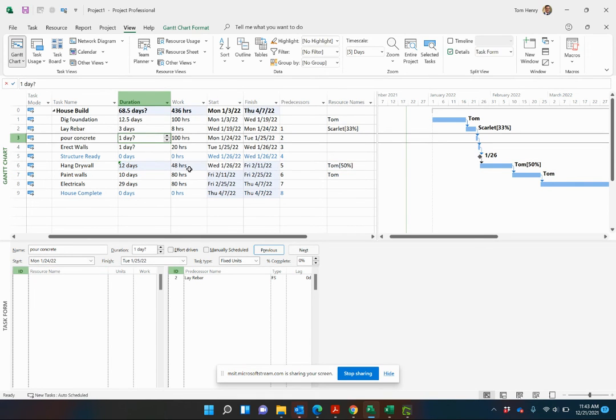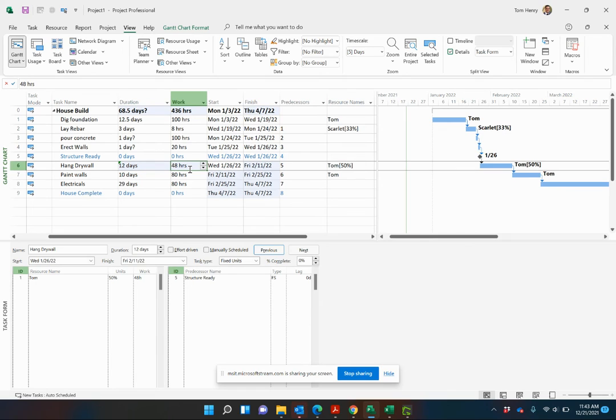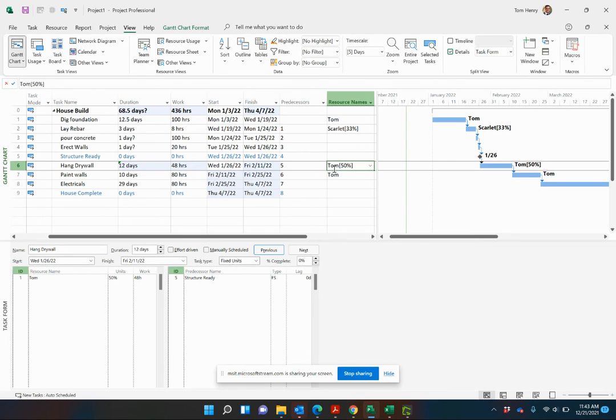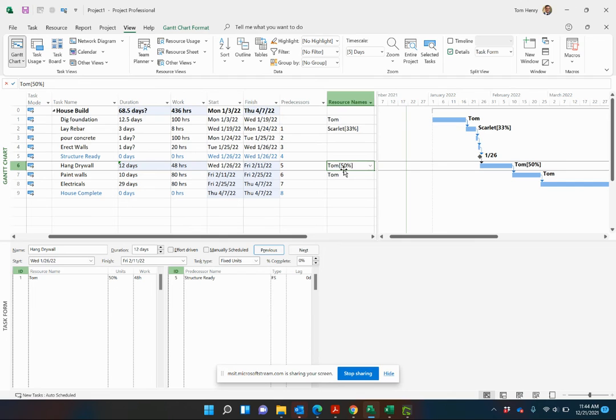You see the work is actually going to go up proportionately to the units of that particular resource. So we put an extra two days, add in an extra eight hours. Because he's only working part time, 50% units, which is four hours per day. So there we go.